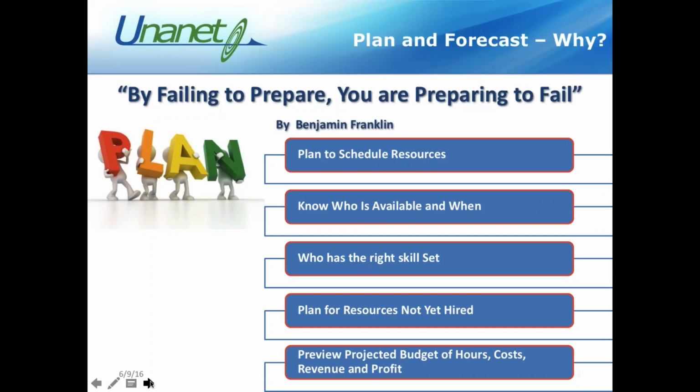So it's important to really know that you have the ability to do all of that in Unanet, and once you decide on that baseline plan, then you can assign and authorize those users to start working, and that becomes your budget or your forecast, and then they can charge time in their timesheets, charge their expenses, and you can track all of that.